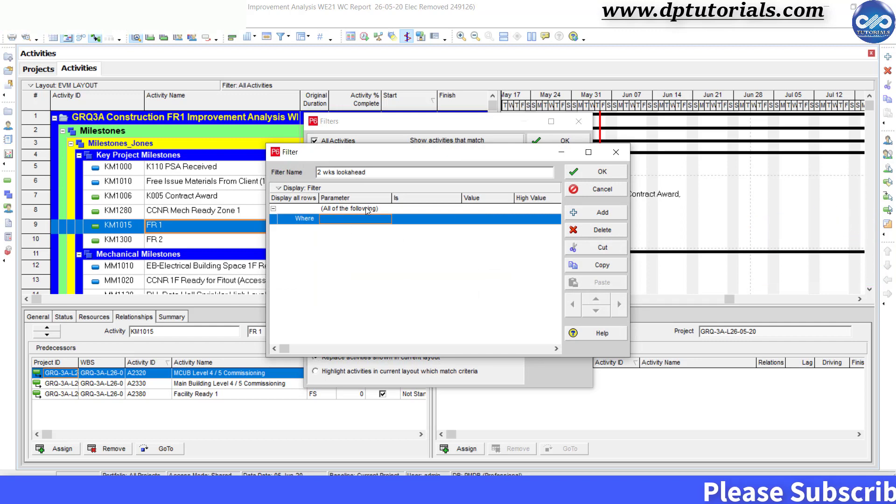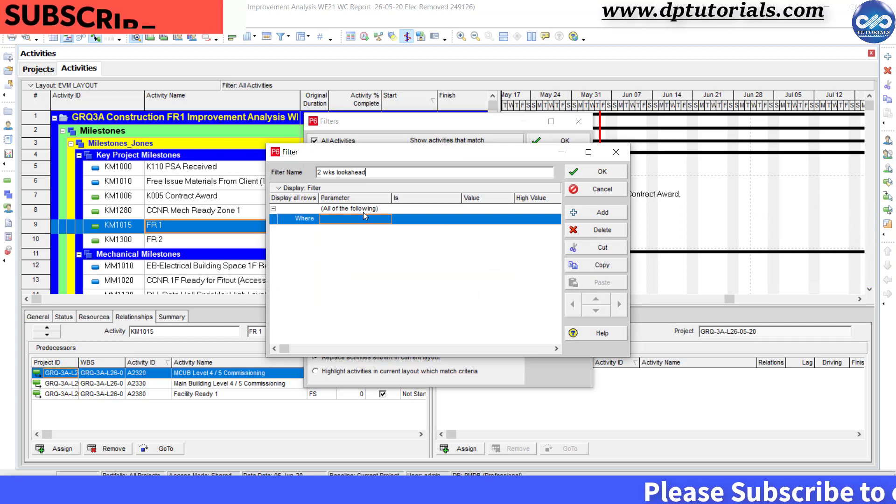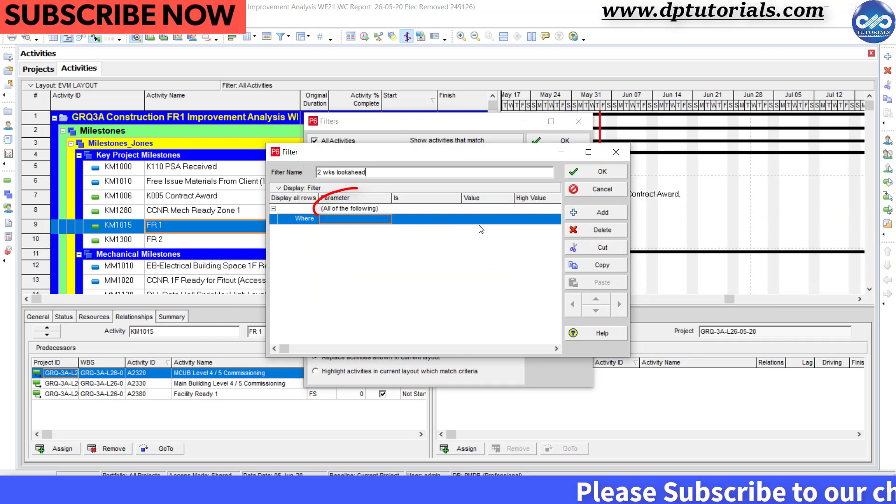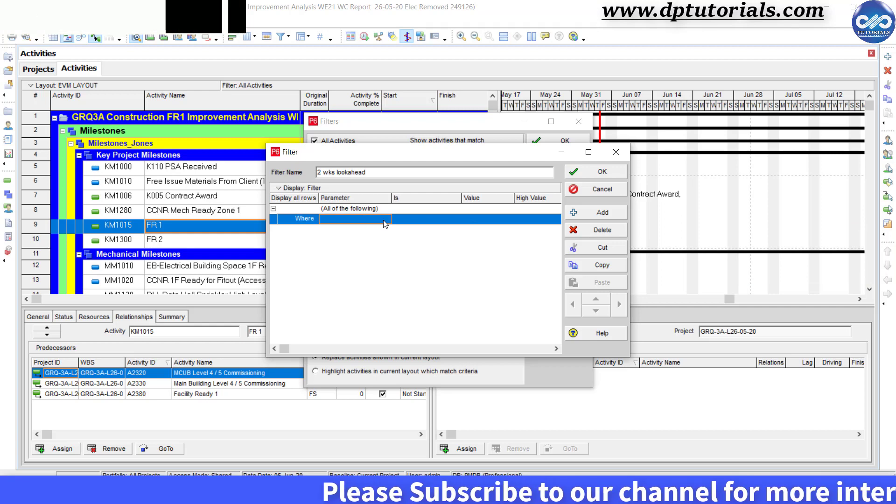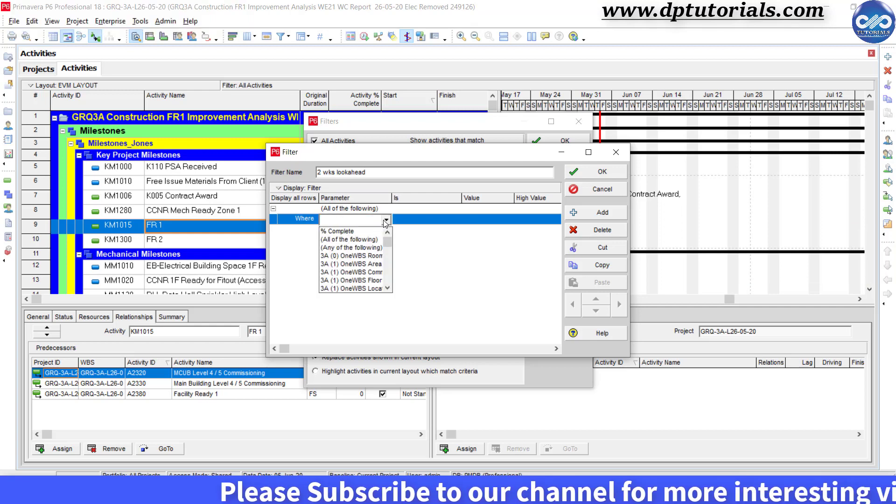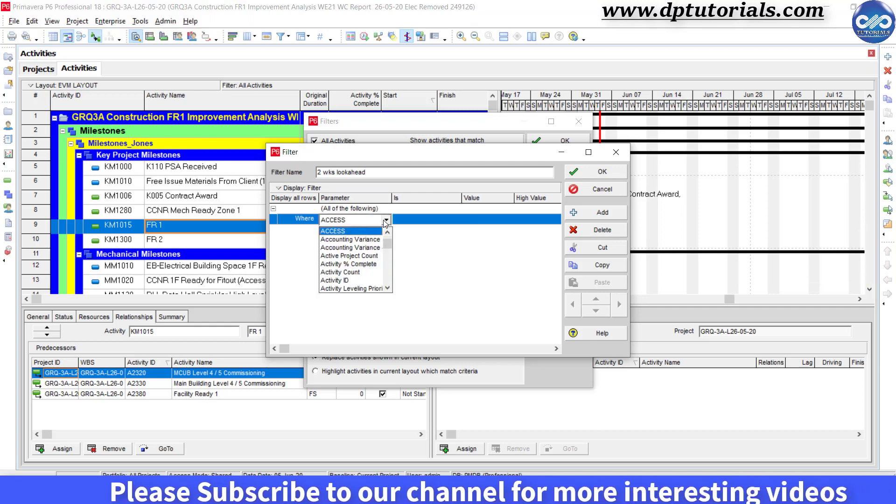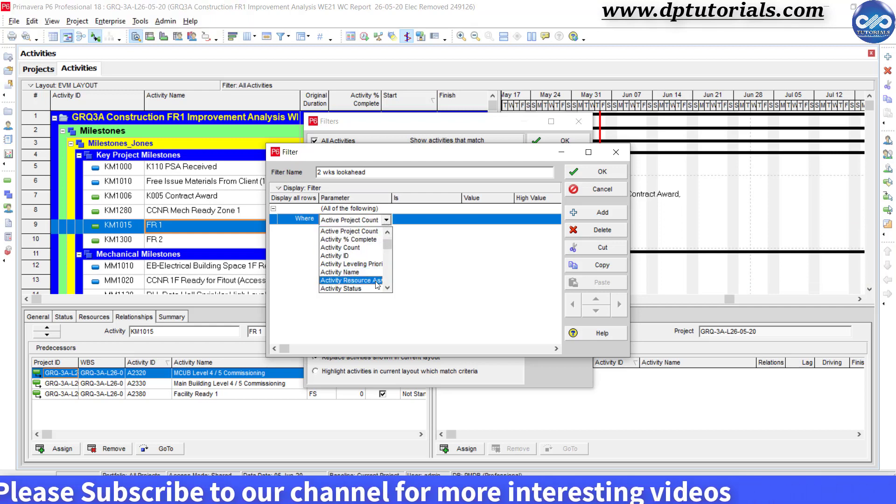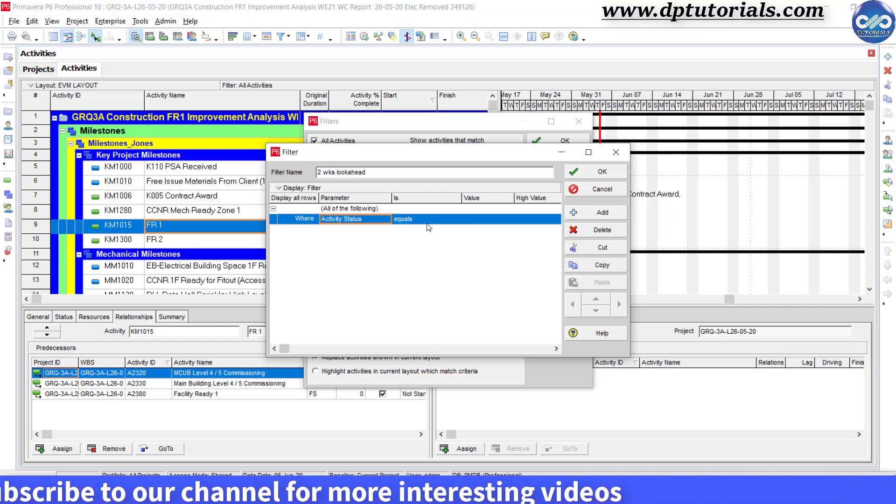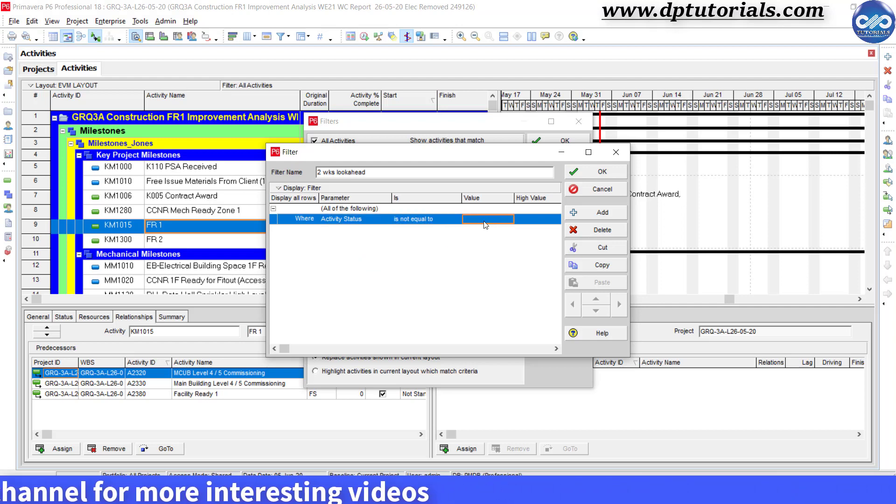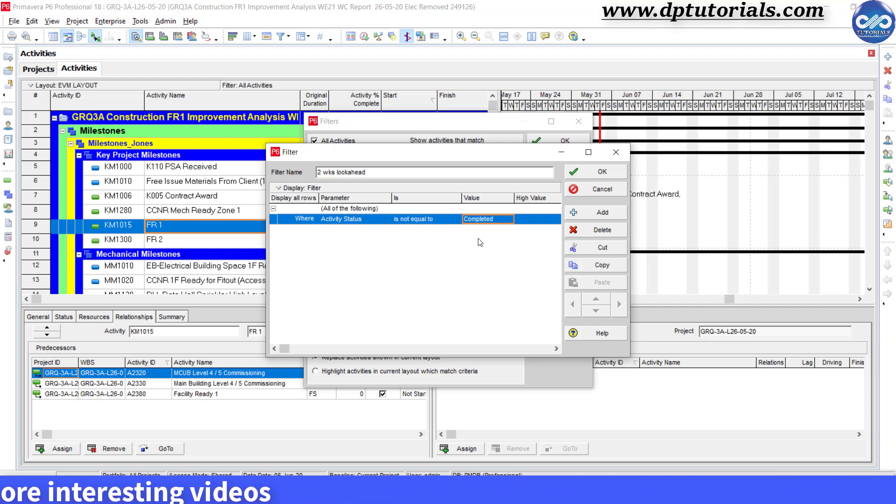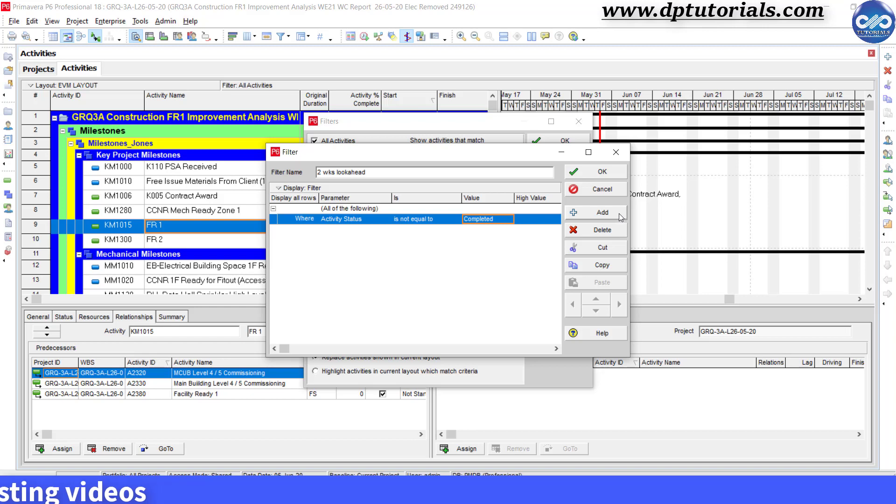Keeping the condition as all of the following, under parameter type the activity status is not equal to completed. Click on add button.